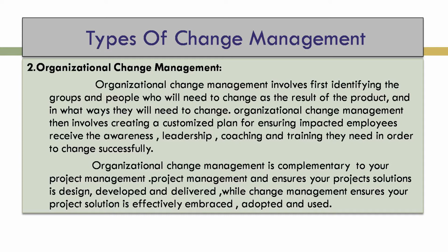Here organizational change management involves first identifying the group of people who will need to change as a result of the project and in what ways they will need to change. And organizational change management then involves creating a customized plan for ensuring impacted employees receive the awareness, leadership, coaching and training they need in order to change successfully.